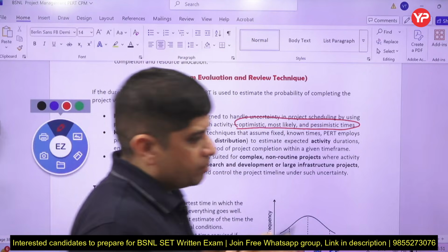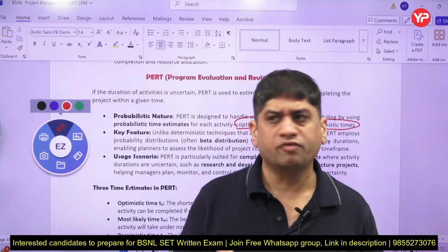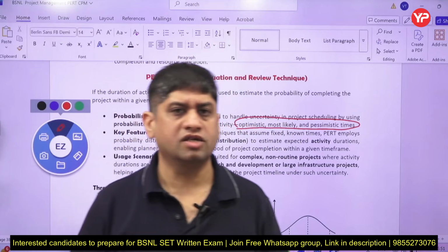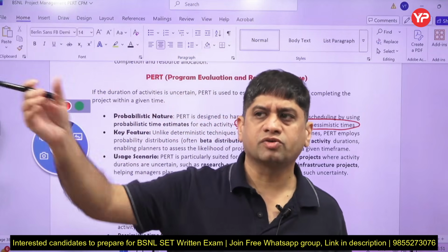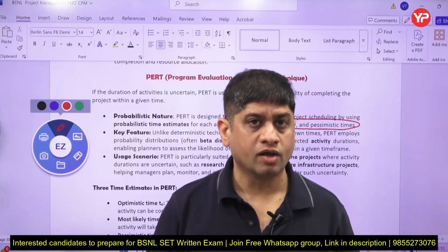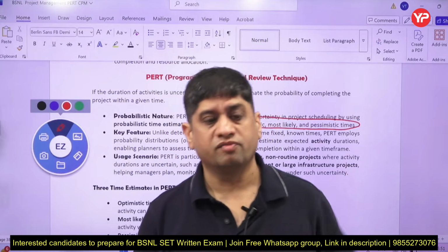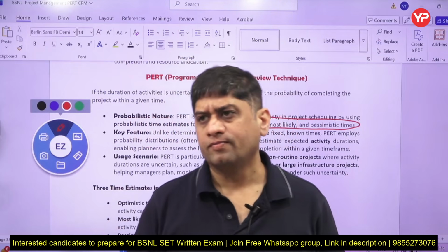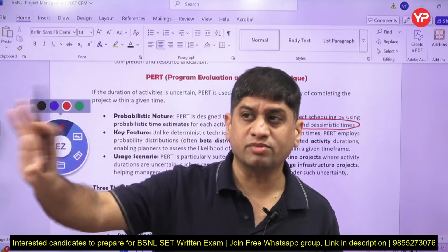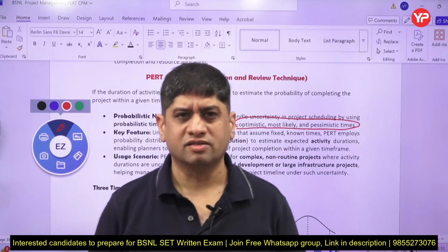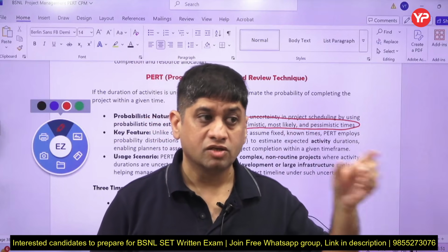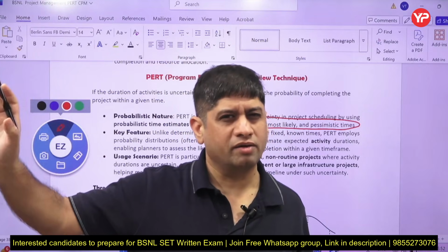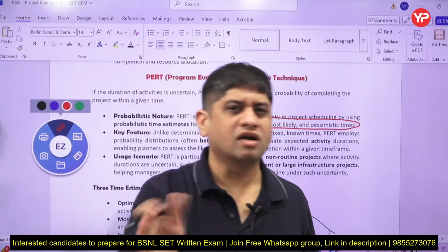Now what is the meaning of that? Take a module: optimistic time, if everything goes okay, every teacher completes his part in the duration they committed, we will complete this project in 25 days. Optimistic time. Now suppose a teacher is not available, faced some kind of sickness, or took some leave, so it stretches to 40 days. Pessimistic time. Most likely, 30 days. 25 optimistic, I will complete this project in 25 days, everything goes okay. 40 days pessimistic, everything goes bad, wrong, I could not complete it. 30 days on an average.